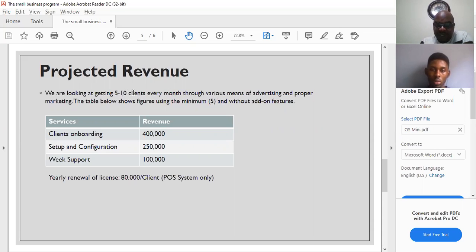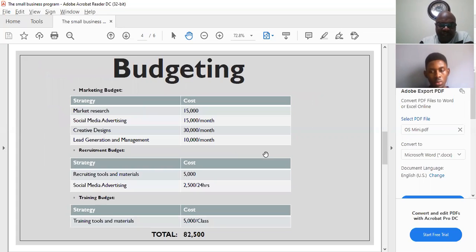And this is the only medium we can use to track these people. They need to put in their time daily because they're going to be contractors. We're going to need to be able to track their activities on a day-to-day basis. So every day, the goal is for them to turn in their timesheet. As time goes on, we'll break down their tasks into activities, and those activities we'll be able to put a value to.